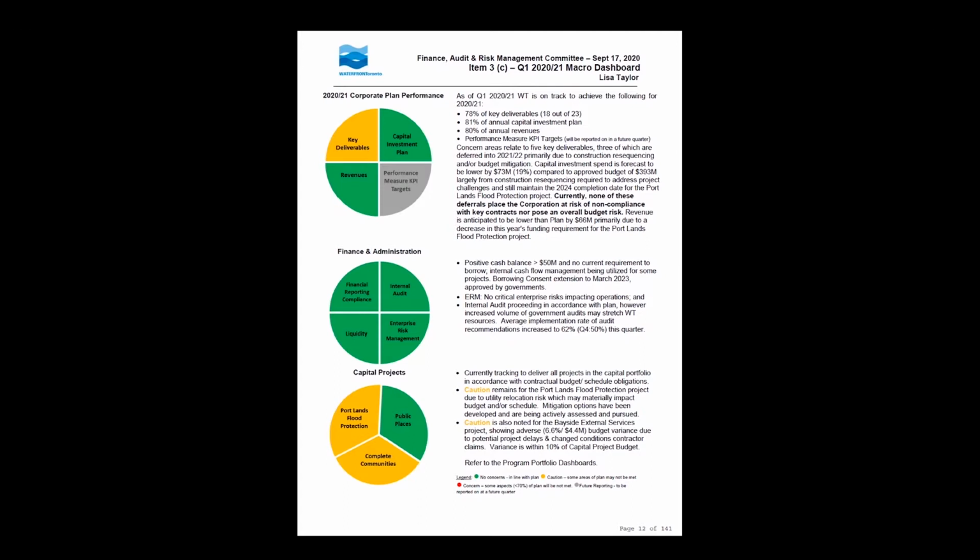So the cash flow risk really stems from the time that it may require to approve the changes to the contribution agreement, because it will need to be amended. So it could be that that time period may be greater than 3 months, which is our working capital amount of the 90 days. So we may see a decrease temporarily in our working capital for the project. However, we are working closely with governments on this issue, and we continue to monitor the situation.